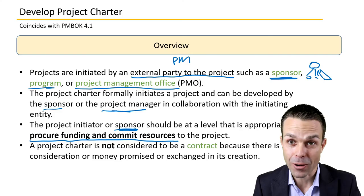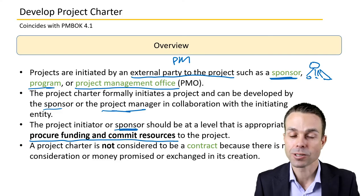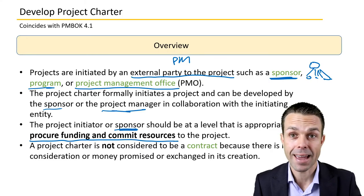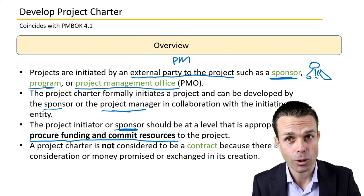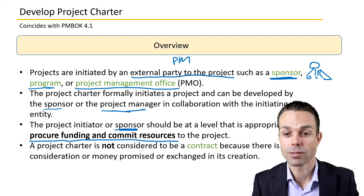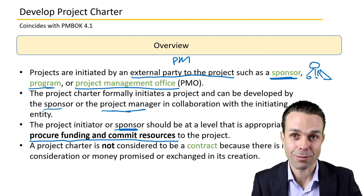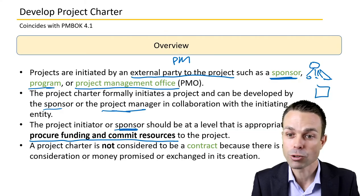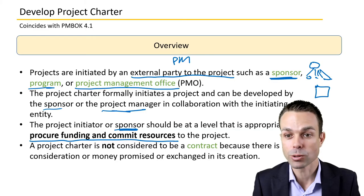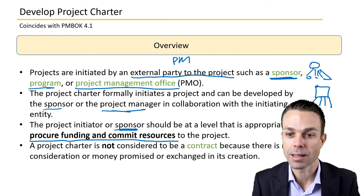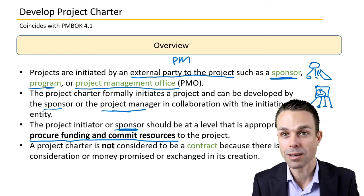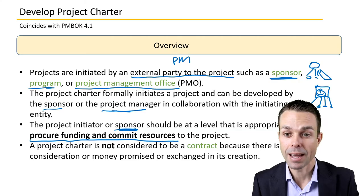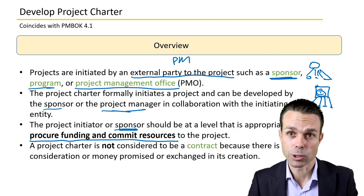The project initiator or sponsor should be at a level that is appropriate to procure funding and commit resources to the project — this is very important. The project sponsor needs to be at the right level so they can commit resources themselves without having to go elsewhere. If they control the area, the resources, and can commit funding, then you've got it all in one place. It's much easier — just keep that one person happy, go to them for decisions and any changes.